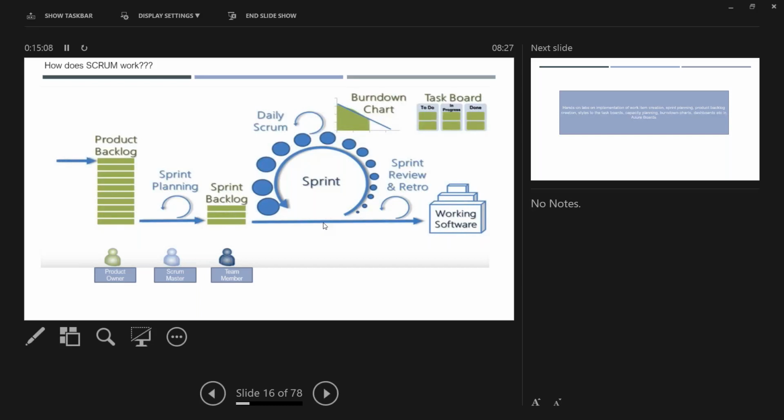Then your team or manager will come to know, okay, this guy couldn't finish this task yesterday because of so many reasons. So he can or someone can help, but in reality, it never happens. That's where you will miss your deadlines, though you are using Scrum methodology. The whole idea of Scrum methodology is that you should not run into troubles. Every day you have to tell your troubles and get them resolved and then move ahead. So you keep the actual effort there rather than the time spent.